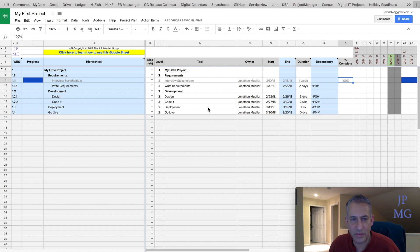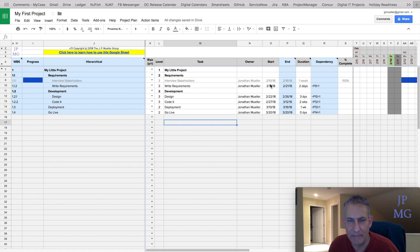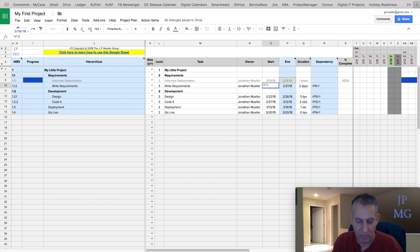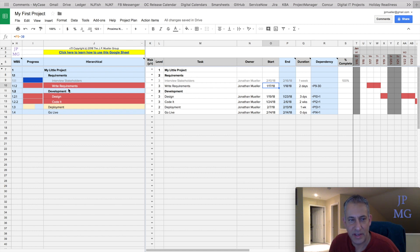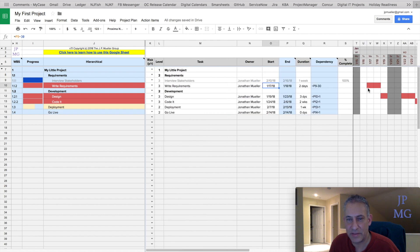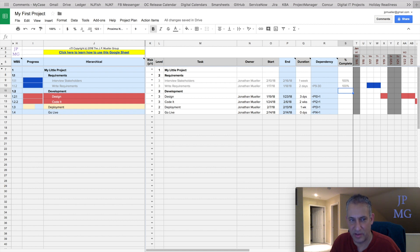We could also have past due tasks — let's add one just for fun. Let's say this task's start date was 30 days ago. When I make that past due, notice what it does — it goes red. And because these other tasks were dependent on it, they went red too, as well as the Gantt bar. That's what happens when tasks are past due. If I mark it 100% complete, it turns blue because it's actually done, but the dependent tasks remain red because they're also past due.